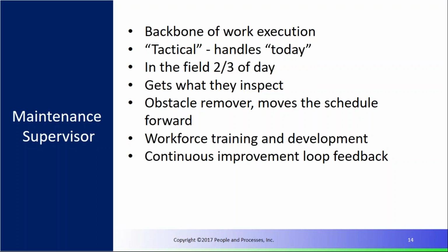And so with regard to getting out there in the field, the goal is to remove obstacles. And I'll share a thought with you, and I heard somebody say it the other day: for plan work, if a maintenance technician is having to go to the storeroom for something other than basic nuts and bolts, then there's a problem. Because we shouldn't have to do that if we plan the job correctly. And I realize you may not be along the journey far enough to be able to do that, but that should be an end goal for you: how do we eliminate the travel time and the technician having to go to the stockroom?